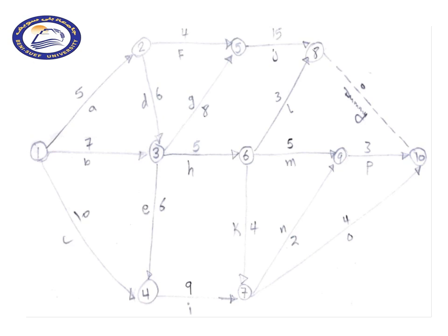It doesn't have to look identical to your network, just the numbers of the nodes should be in the same order, and we should all start in one specific node, that is number 1, that represents time 0, and they all should finish at the same node, whatever its number will be.